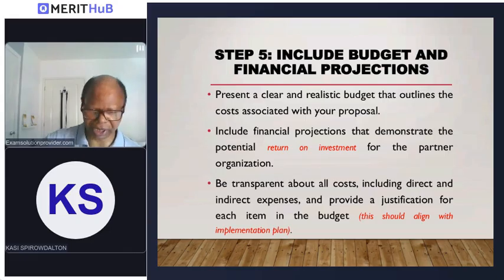So if for each subsequent year you add 10%, the costs are not going to be the same every year, because the cost is only fixed for a year. At the end of the year, you review how much each dentist is actually earning, and then you add 10% because they expect a salary increment. Okay, so you need to include this, which means it's going to be different for each year.